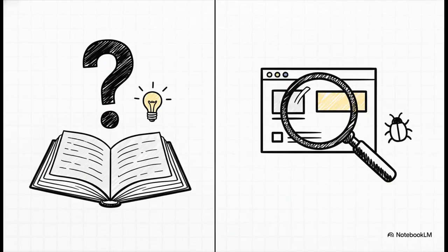Here are 2 more clever tricks for you. Try writing the user manual way ahead of time. If you can't clearly explain how a feature works, you probably haven't defined it well enough yet. Same idea goes for testing. If you can't figure out how you would even test a requirement, that's a huge red flag that the requirement itself is probably way too vague.